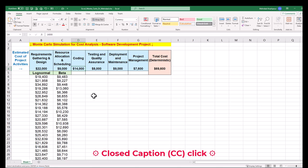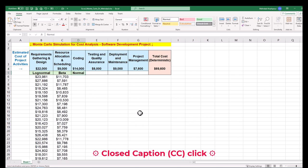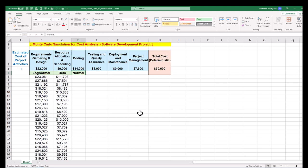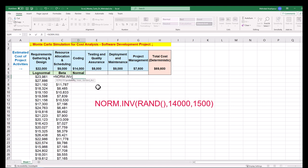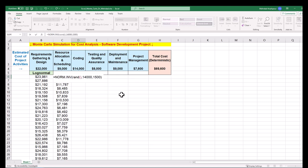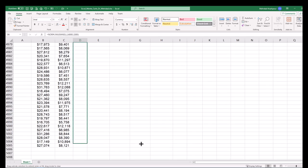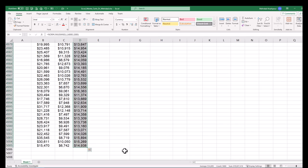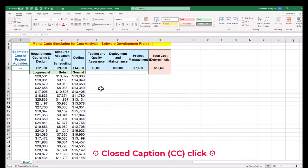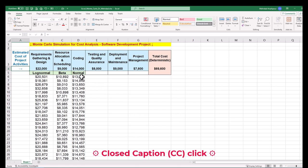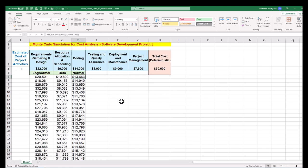The third project activity of coding has a single point estimated cost of $14,000, and our previous projects show that the best fitting distribution is a normal curve. We generate random inputs by left-clicking on the relevant cell, pressing the equal sign, and entering the norm.inverse function in the formula bar. Click and drag down to generate 5000 non-deterministic samples. Note the variety in distribution choices in our example, which may or may not be the case in all projects.